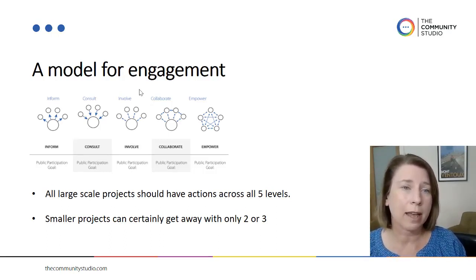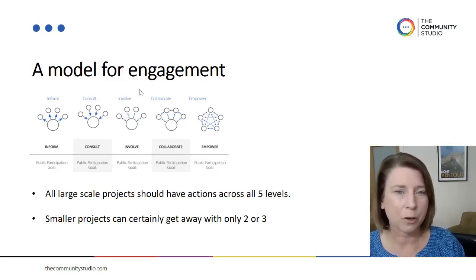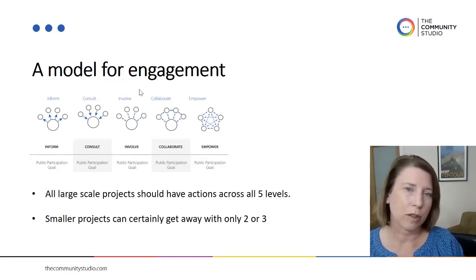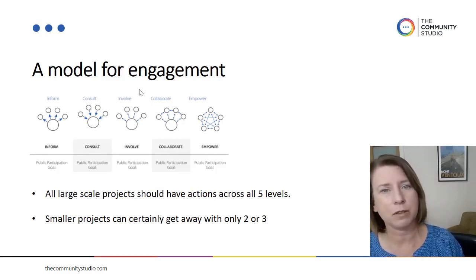But what is not okay is putting stakeholders in an inform and just feeding information out to them if they actually want and need to be further up that spectrum and working in a far more dynamic situation with you in terms of the engagement. That's where you'll find you'll get into trouble if you're only using inform and consult tools, but you actually have stakeholders that need to be further up that model.